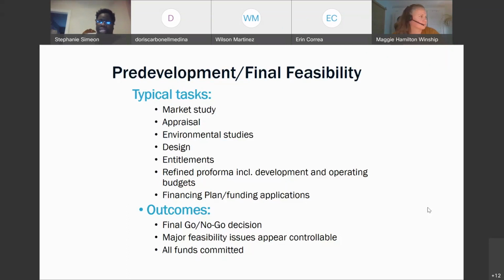Something you can't see, but it can't be done without addressing those environmental issues. Now, because you're in the feasibility portion of this, these are just the reports you need to tell your potential funder that this is what's going on at the site that I'm proposing the development. In your proposal, you're going to put how you plan to address the findings from these reports. You have to put that in the narrative.